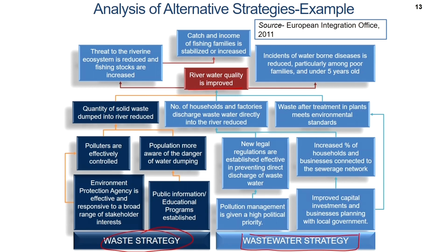So, the flow of thought, we flowed very logically with respect to the problem that we are studying here. We begin with the stakeholder analysis matrix, then into problem analysis, then we go into the objective analysis and then come up with strategies analysis. So, this is the analysis phase of the logical framework approach for project design.